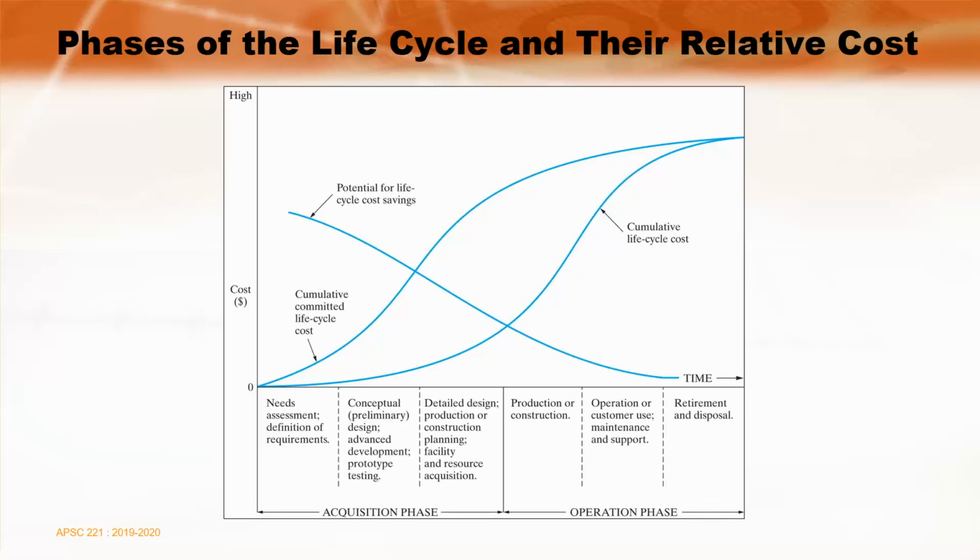for example, we often will negotiate with subcontractors and get contracts going before the final design is produced. We'll start to say, okay, well, we know we're going to need so many tons of concrete, or so many electricians or plumbers, and we will start to set up contracts. So if I want to start construction on my new apartment building at the beginning of June, it might be necessary for me to line up the subcontractors that I'm going to need in January and make sure that they mark in their calendars that they're going to be coming to my place the 1st of June to start construction.